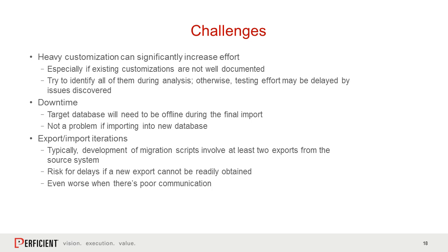If you remember the process flow I showed at the beginning, there's that development box, and then the dry run afterwards. That's when you want to be handling this. You don't want to be in the middle of the official validation and run into an error because you were missing some set of customizations or dependencies from the source system.